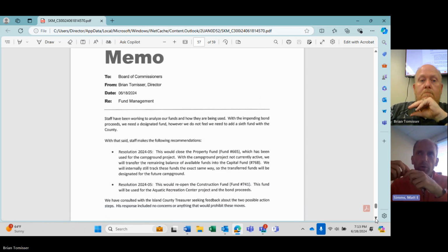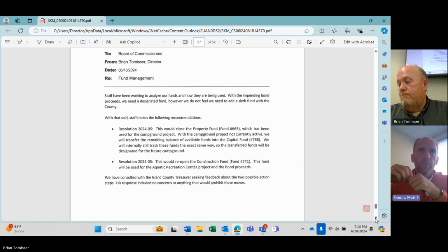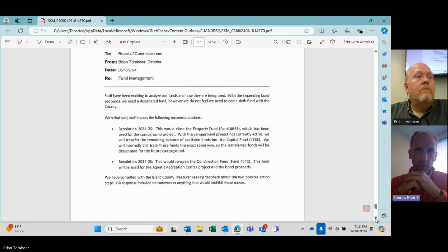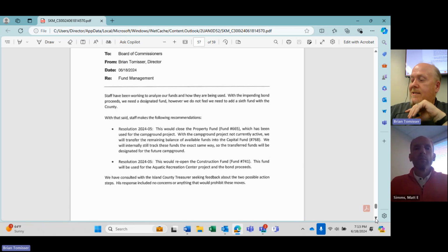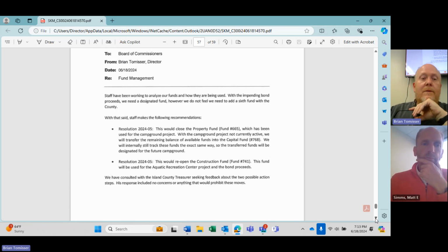Just one note real quick, to your timing point there, Brian. We currently have that budgeted in the month of August. So if it's going to be September, October, we're going to be carrying $130,000 deferred, more $130,000 in additional deferred capital. So just be aware that we're going to be piling things up, looks like towards the late third and fourth quarter. But this is just one more thing in that stack. Carrie caught that earlier too. She'd asked that same question. So we're probably not going to be billed till October for this now. Yeah, okay.